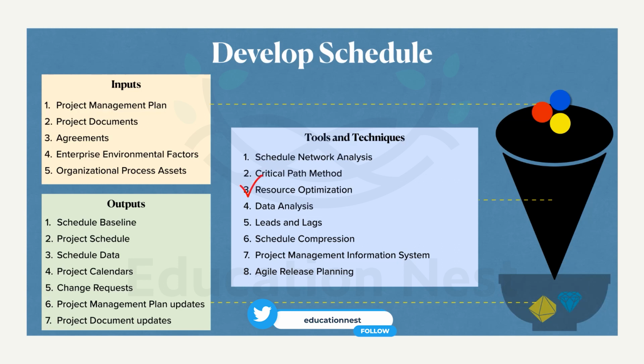How many engineers do we need? How many construction workers do we need? And how many do we have? This comparison is called resource leveling, one of the optimization techniques. The other technique is smoothing of resources, playing within the available time, so it won't change the critical path. So these are the two resource optimization techniques. Just keep them in the back of your mind.